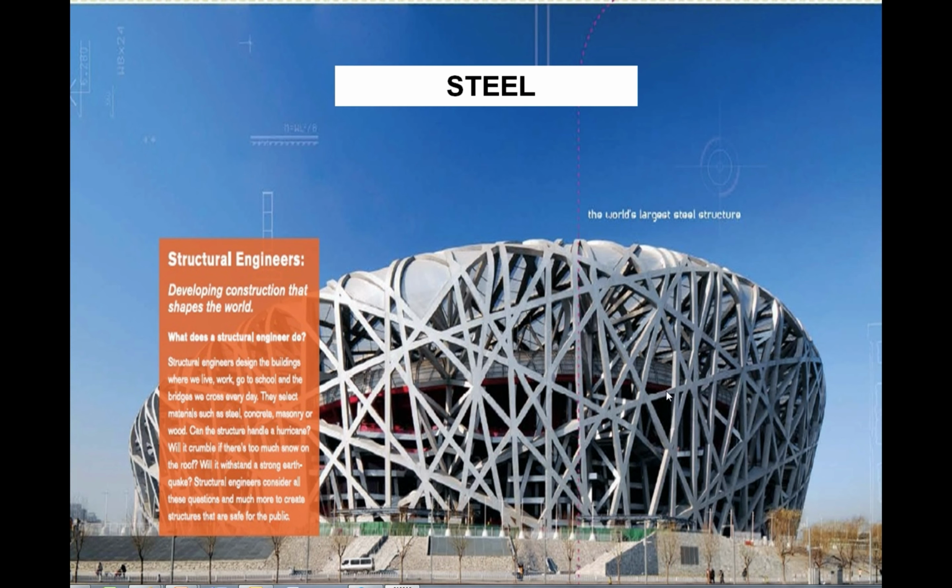Everyone's aware of it. It's when you get projects like this that it becomes a lot more difficult to build, construct, and do it all correctly, because it's unique. The shapes are atypical, the lengths are atypical, your bolting patterns are atypical. It throws a whole new wrench into things, and it probably makes construction harder and slower, and obviously will drive up your costs whenever you have an atypical structure. So most of the high rises have the same kind of layout.